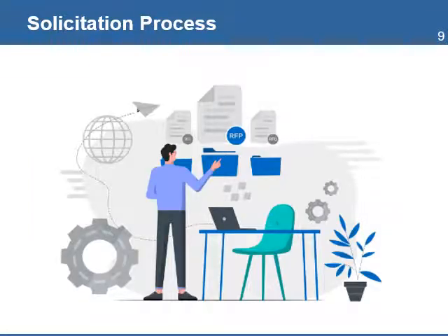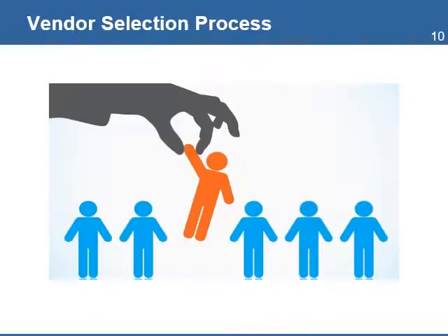Solicitation is the process of sending to prospective vendors the RFQs, RFPs, and bid solicitations. The information provided should include detailed information on the project, the requirements, the statement of work, the schedule, and instructions on how to submit the quotes or bid documents. The clarity and completeness of this information will increase the quality of responses from all vendors.